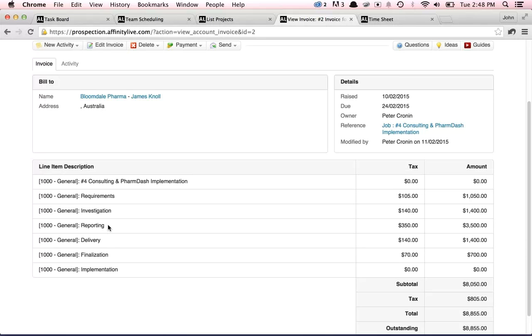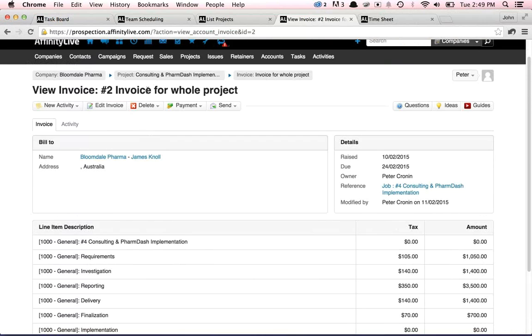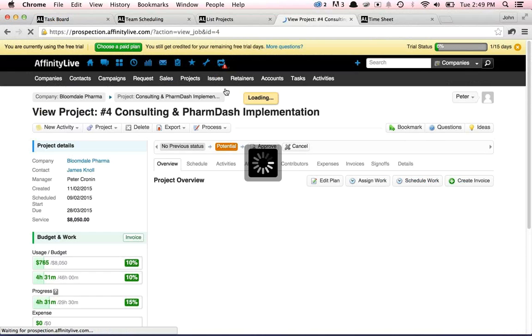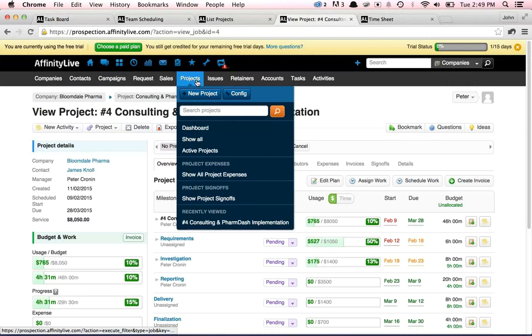Good. So just to recap, in terms of the way the system's built, I'm thinking how we would practically implement it. If we sold a project for 20K, for instance, we would build a project plan using that Gantt chart, estimate the amount of hours required for each of the tasks, allocate that to the resources internally, and use the tool to monitor progress against each one of those tasks while it's live, but come invoicing time, we would just invoice the 20K regardless of the hours consumed.